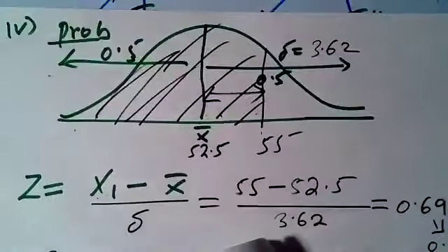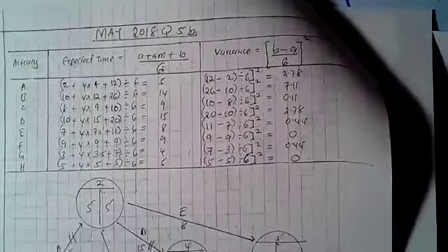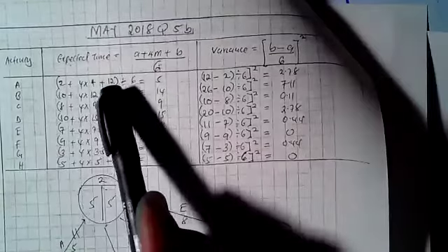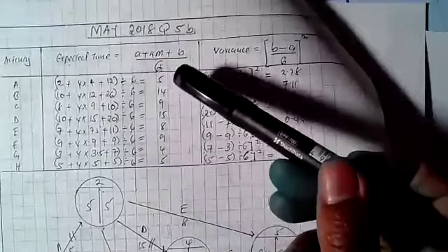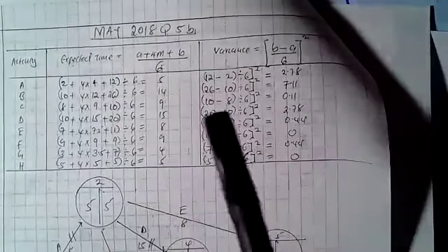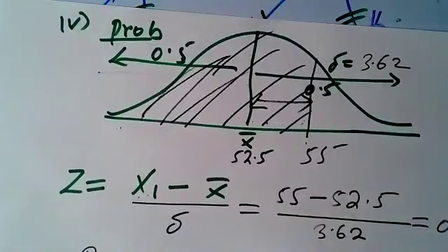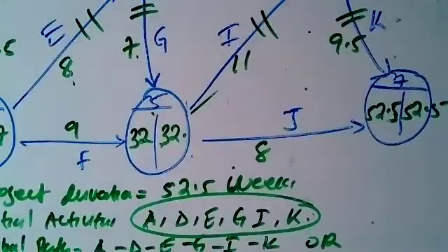In this case, I am not showing you how to get that, you already know how to compute it. So here we have the answer: you take A plus 4 times M plus B, which is 12, then divide by 6. What you get here, for example for A, is 5.14. Now this is what will go to the network. My motive in this question is just to show you how to draw the network. So how do we draw this?